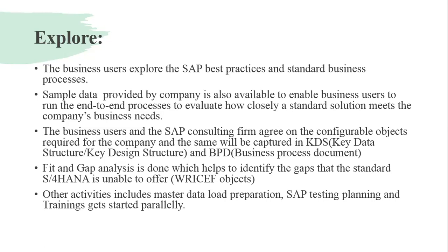The next is the fit to gap analysis, which helps to identify the gaps that the standard S4HANA is unable to offer. So you have to have your RICEFW objects. RICEFW is basically a term that is used to capture processes that do not fit into the standard. So you have the forms, you have the reports, you have workflows and the rest of them.